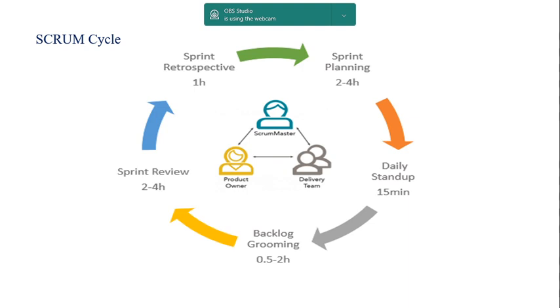That's what I planned, and in that I'll divide what has to be achieved for the day. What are the things we are going to achieve for tomorrow and all. So we are going to record it. And what is the daily stand-up meeting? It is a very informal way of checking what we have reached for the day. Wherever we are, for a few minutes we'll assemble there and discuss what the assignment is for each and every person, whether they have achieved it or not, whether they are facing any difficulty, and what kind of things can be discussed to sort it out if they are facing any difficulty.